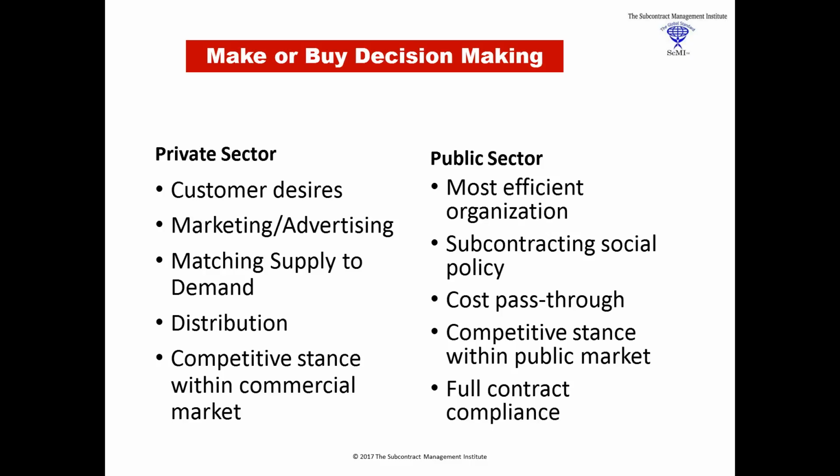The government won't want to do this, but I caution primes in this respect. If you ever get those little whispers, the FAR actually allows the government to designate a subcontractor for you. There's just one thing they have to do. They have to do a full-up determination and findings, a justification for sole source acquisition, even at the sub-level. And they have to give that to you. But we all know how it really works. The whispers are heard. The prime goes off and contracts with the small business, and technically it may not be the best decision.